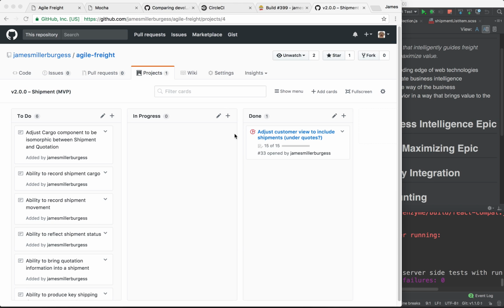Last video, we finished the sprint review and the sprint retrospective, which means there is no gap in between sprints. So that's a free answer to a PSM1 question. The next sprint begins immediately, and it begins with sprint planning.